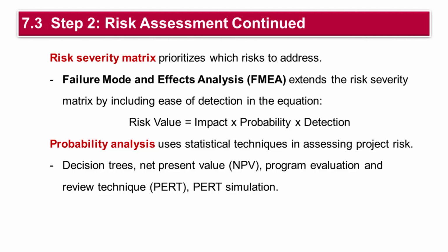Failure mode and effects analysis, FMEA, extends the risk severity matrix by using the equation risk value equals impact times probability times detection. Each of the three dimensions is rated according to a 5-point scale.